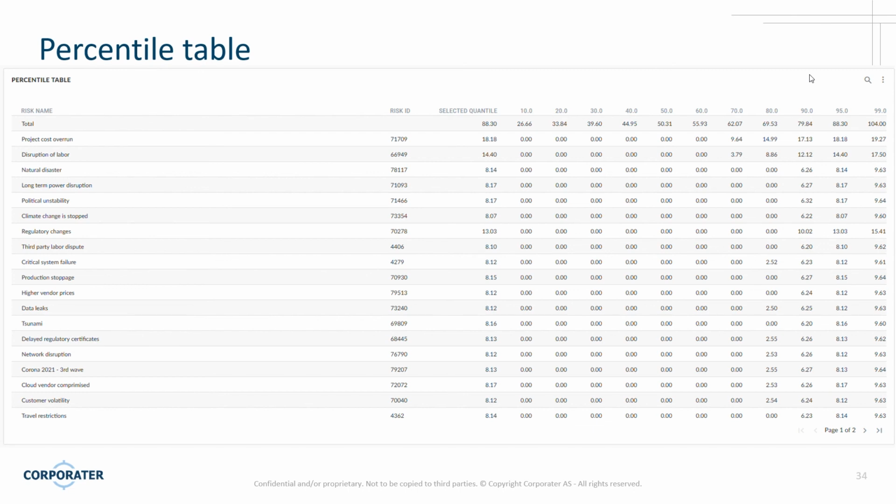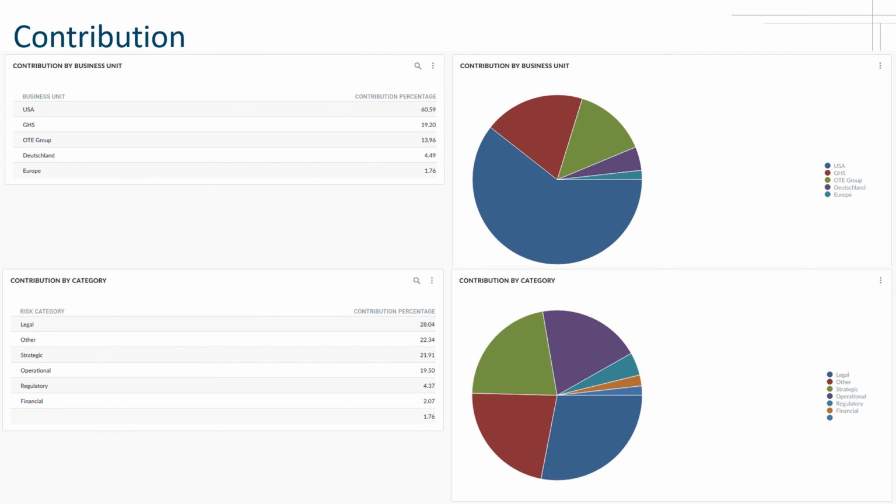And we can also rank all of these risks at different levels as well. It's probably more useful, though, to organize them like this, where we look at the contribution. To look at the contribution, we look at risks at our level of certainty. So if we want to be 95% certain, we will look at the risks by business unit or by category at that percentile. And we can show the contribution. I have this showing contribution by percentages, but you could also have the raw number, how many millions they contribute to the overall value at risk, either way. And if you go to lower levels of certainty, some of these orderings and groupings might change a bit.